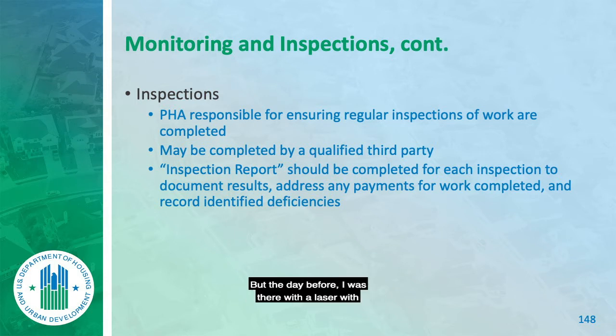But the day before, I was there with a laser with my guys teaching me to see if they were crowning the pad. You know what crowning the pad is? It's where they make the pad the proper thickness on the outside, but they slowly crown it up on the inside so that they can save money on concrete and give you a shorter pad in the middle. And on one occasion, we threw the laser and he was crowning the pad. Well, we knew. The guy I was with could sight it. He could see it. He goes, this pad is crowned. Let's do some sights.